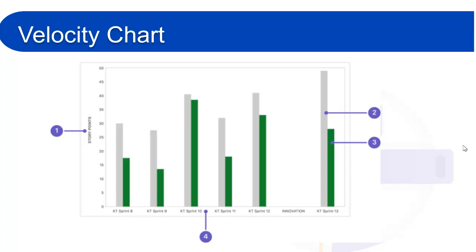Now, coming to the velocity chart — first, the estimation statistic as mentioned, and here we have seven sprints: one through seven. In every sprint you can see a gray bar. The gray bar for each sprint shows the total estimate of all the issues in that sprint when it begins. One important point: if you add any story or make any scope or estimation changes after the sprint has started, those will not be included in this total.